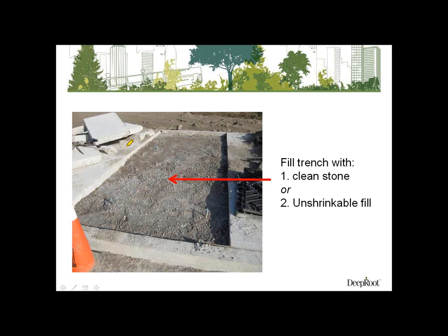So then you get a foundation. You make a temporary repair, and then at a more appropriate time, after you've been able to notify the different people who are going to be affected by the shutdown, you're able to come back, close the walkway or whatever's impacted, and make your permanent repair.